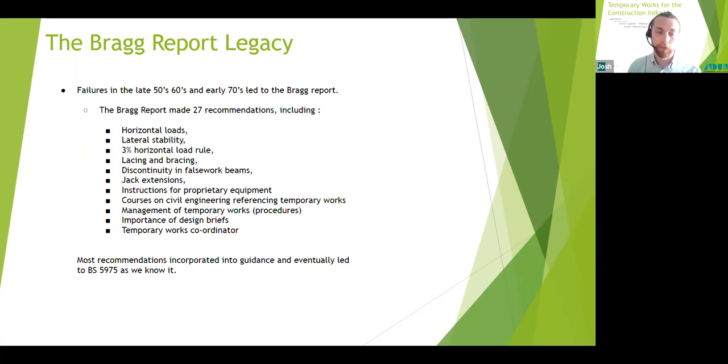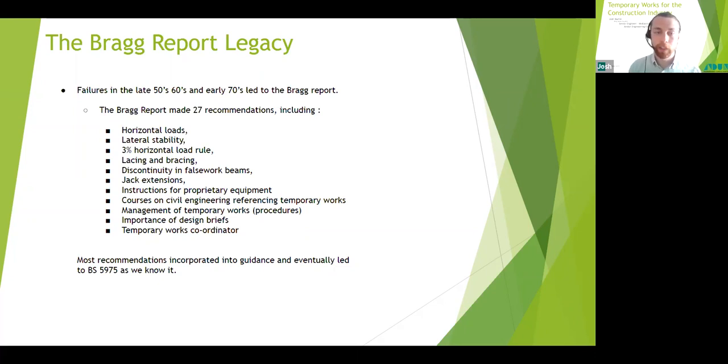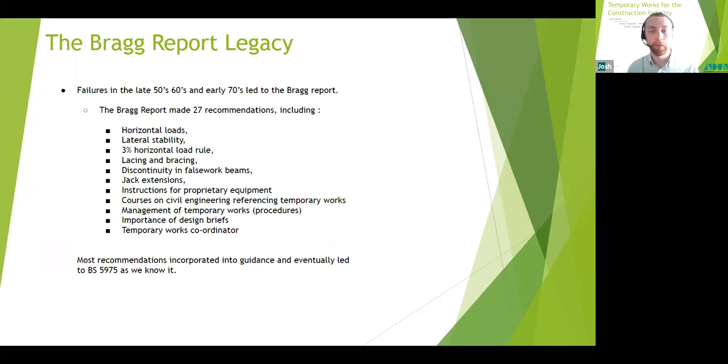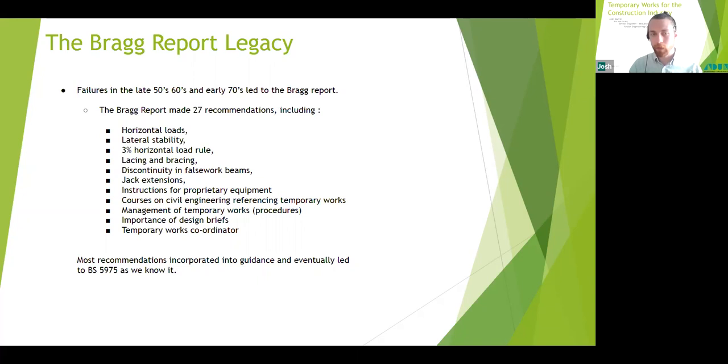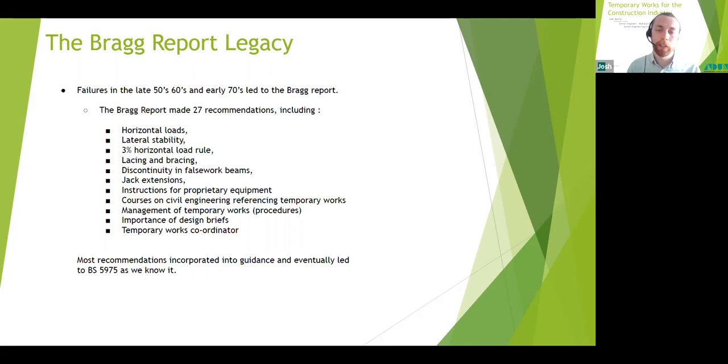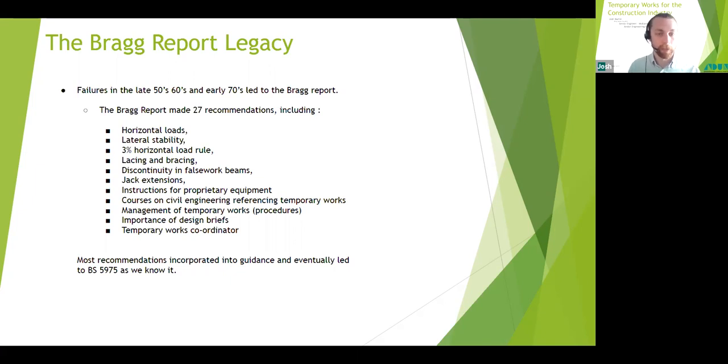The importance of design briefs—this is especially prevalent now that temporary works is commonly carried out by engineers that are not based on sites. Therefore, the brief should identify interfaces that may not be clear to somebody not familiar with the site who may be designing your temporary works. The introduction of one individual, I like this one, so the introduction of one individual who within the construction organization has the duty of ensuring that all relevant procedures and checks are carried out, and such individual being known as the temporary works coordinator. That role was introduced in the Bragg reports.